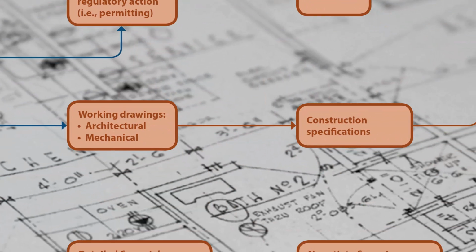From rough boxes outlined to a specific elevation and floor plan schematics, in the deal-making phase, design moves on to construction drawings, or blueprints, and the development of specifications. Instead of simply giving a look at the finished product, construction drawings provide details necessary to build the project, down to instructions about where to place electrical outlets and heating and cooling vents, and what type of carpet to install in common hallways. A developer uses construction drawings not only to obtain building permits and potentially other public approvals, but also as the basis for obtaining firm construction pricing.